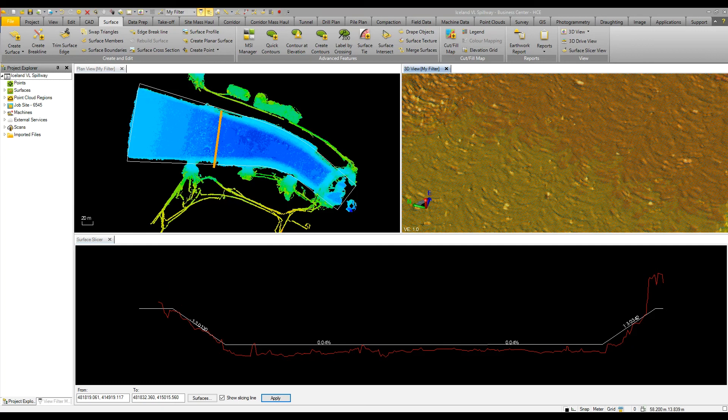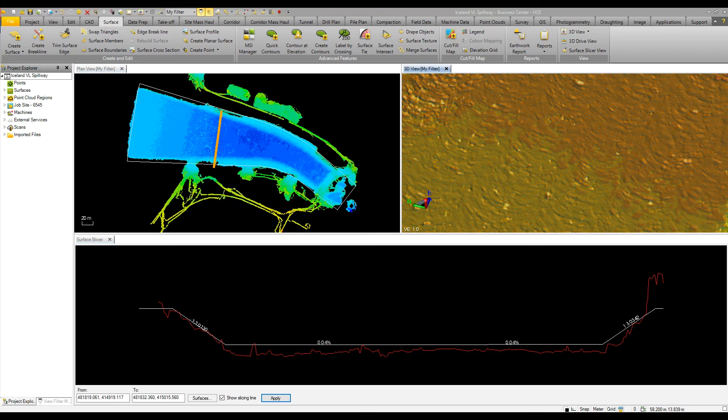From this, we could determine as a job is progressing what's the time needed to complete a project. Are we then working to schedule? Report that volumetric information into Tilos and see if that is on schedule, and plot plan and cross-section views showing compliance to design specifications, as we've seen in the other videos.